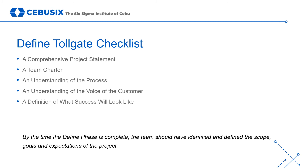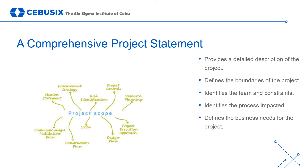By the time the defined phase is complete, the team should have identified and defined the scope, goals, and expectations of the project. The defined tollgate checklist includes all of the mandatory steps to ensuring that you have completed the phase, such as the creation of a comprehensive project statement, the development of a team charter, an understanding of the process being improved as well as the voice of the customer, and a definition of what success will look like. In order to create a strong problem statement, we need to declare where and when the problem was recorded, what the measurement of the magnitude for the problem was — preferably with some tied to cost — and a brief description of the problem understandable by professionals not closely aligned with the process.